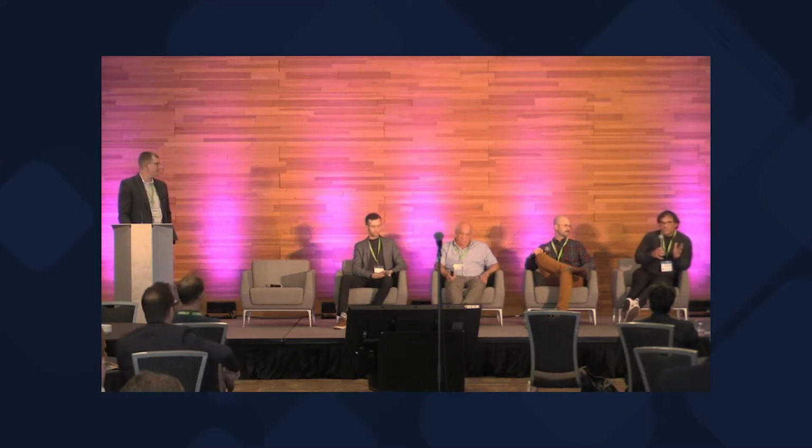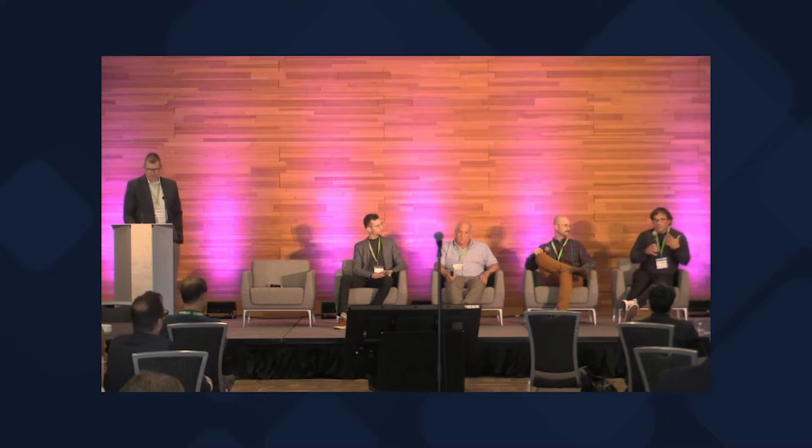So to your point, that's just moving things up the stack, right? All of a sudden, in 50% DD, you have to have a pretty set structure, because when you go into production, depending on the scale and size, you might have to start producing 6 months or a year before you can actually install a panel. All these things are being pushed up, and it's forcing people to adopt digital technologies at a much more rapid scale, which we've been fortunate to be involved with at UBC.